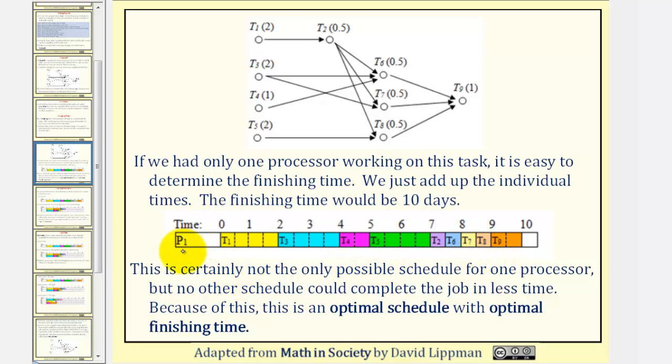Notice how the processor is completing the task in the order: task one, three, four, five, two, six, seven, eight, nine, taking ten days. This is certainly not the only possible schedule for one processor, but no other schedule can complete the job in less time. Because of this, this is an optimal schedule with optimal finishing time. An optimal schedule is the schedule with the shortest possible finishing time.